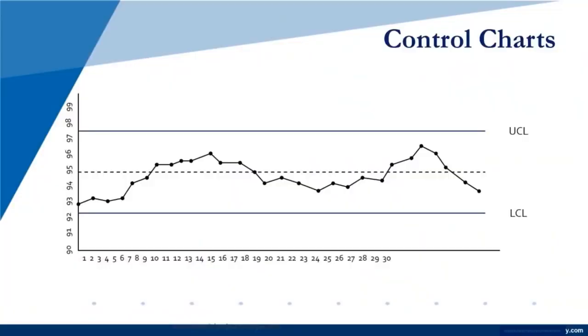Control charts. Now, these are used mainly in manufacturing environments. What you're looking at on the control chart is an upper level and a lower level that are viewed as the boundaries of the effects that you're charting. So it could be that you have defects low and high, or heat low and high. Typically that's what they're looking for, but they want it to be around this middle line. They view this as kind of the medium. That's the high, that's the low, that's acceptable.